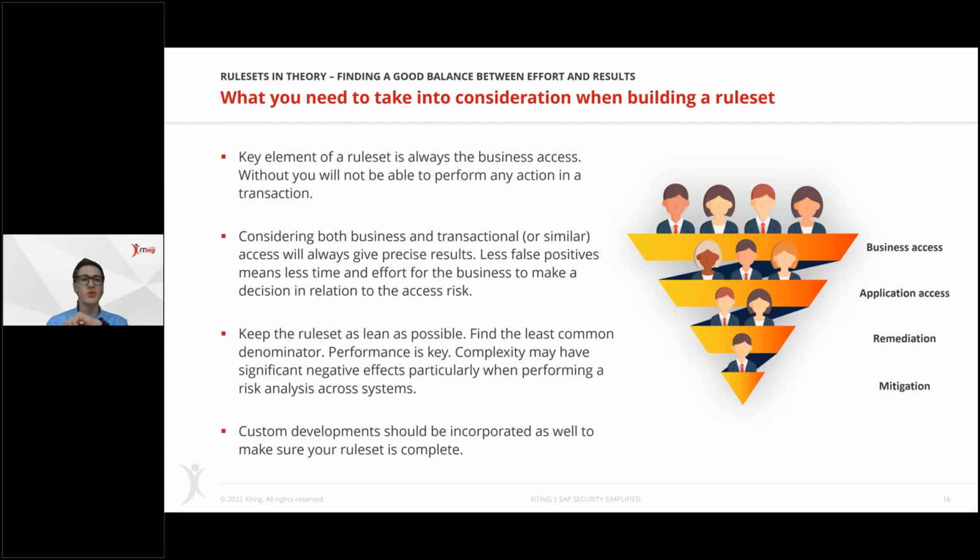So just to emphasize, doing the remediation on the role level first is key for the success of such a project, and then doing the remediation on the user level. And remediation is not something that you can do within hours. That's typically a project, a separate project, once you build the rule set.